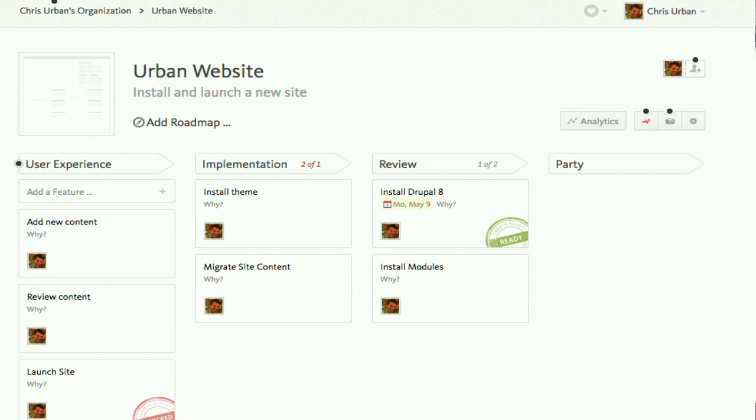What I mean by that, if you look at that second column, you'll see implementation 2 of 1. So real true Kanban. There cannot be more than one ticket in that state because you only have the capacity to do one of those tickets in that column. You can customize what that is, but the fact that it's showing you in red at the top, 2 of 1, you're over capacity. I believe this is the one where you can have it restrict. You can't actually drag a ticket into that column until the column is free, which is even more enforcement. It's a little overkill, but the fact that it's there. The red ticket on the bottom left is blocked. The ticket up on the top right is completed.